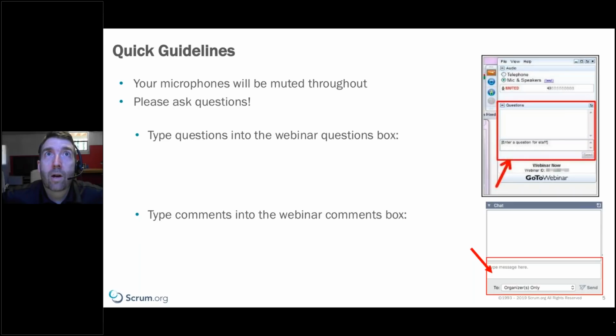Yeah, that's a great question. I won't be quite as blunt as the question asker was, although I have seen that before. What you want in a high-performing Scrum team, and any kind of team actually, is a commitment to continuous improvement. And where a Scrum Master or a development team member can make a big impact here is, what I heard from the question is some of our retrospectives haven't delivered a lot of significant improvements. And so I think that's where the problem lies: every retrospective should end with not only an idea for what we want to improve, but a plan for how to implement that.